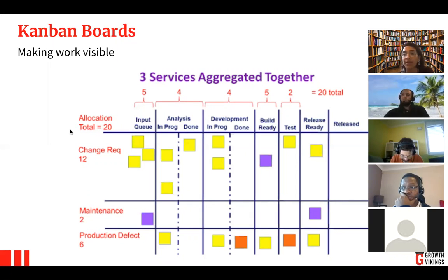And in that process, in that planning session, they set out what's going to be the work for the cycle, and the cycle of work is decided by the team. What are going to be the limits of work given our capacity and given the demand that we're receiving from the organization. So in that moment is when they set out what their working or Kanban board is going to be.